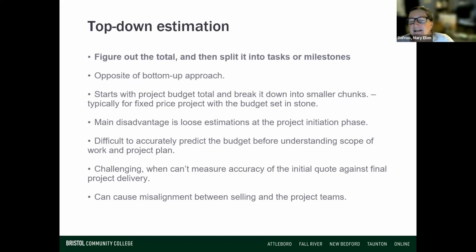And then it's very hard to hold accountable on this, because how do I measure if you stayed on target in the tiles if I never gave you really a budget for tiles? We just picked them because they fit within the $3,000 budget that I said.